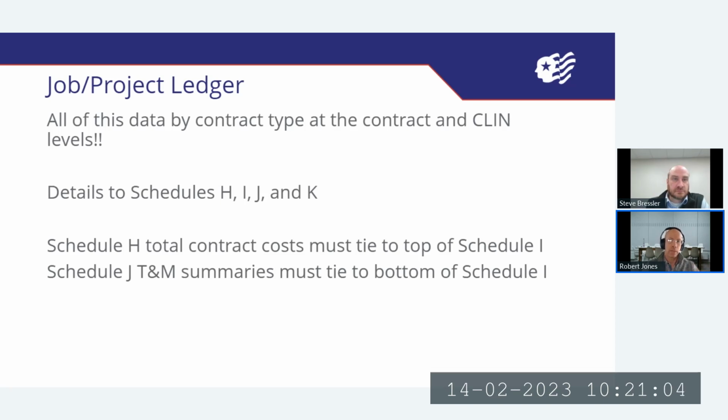You may have, and many of you do have, as many of our clients do have, hybrid contracts. Now, as a little bit of an aside, a hybrid contract isn't a real contract type that you'll find in the FAR. Nowhere will you hear it talk about a hybrid contract. We call it a hybrid contract because the government or your prime will issue a contract to you, and they'll say, okay, there's 4 CLINs on here, and these 3 CLINs are fixed price, but this one is cost reimbursable, or vice versa, right?